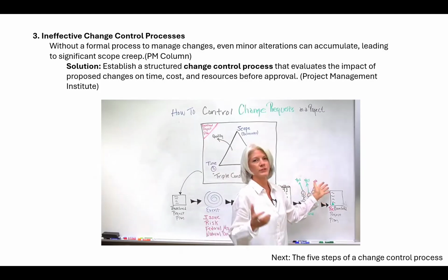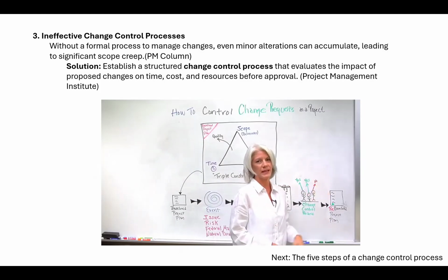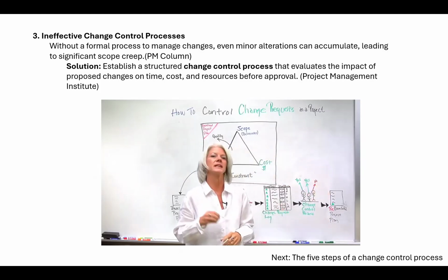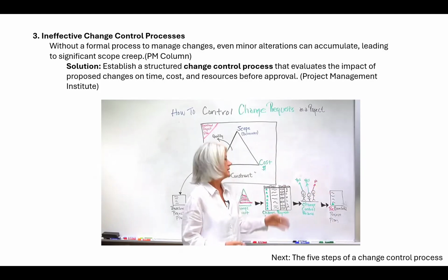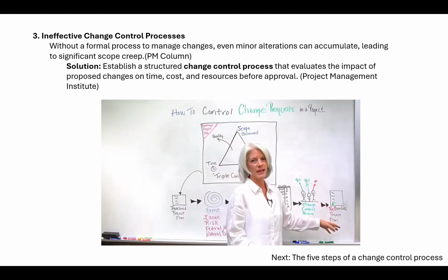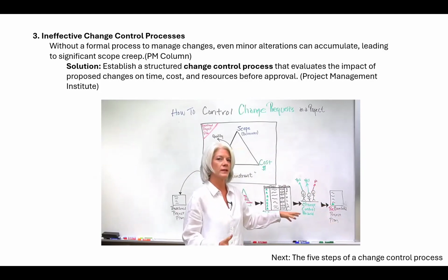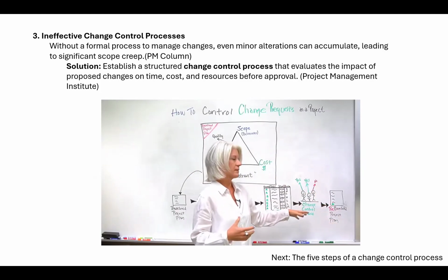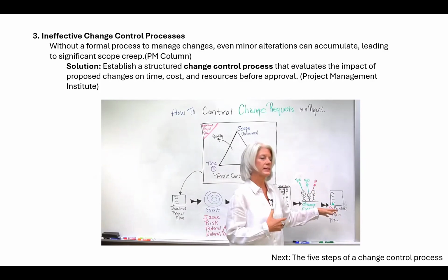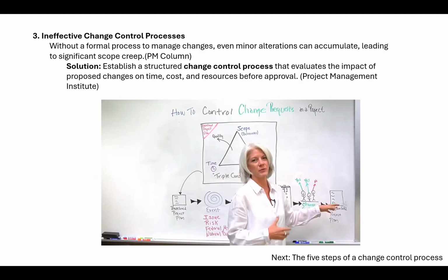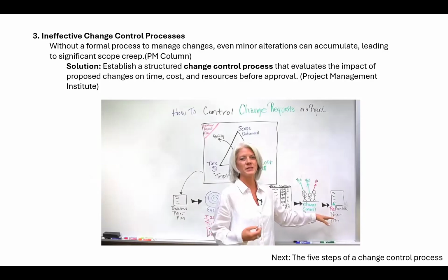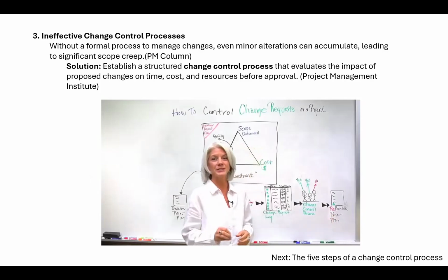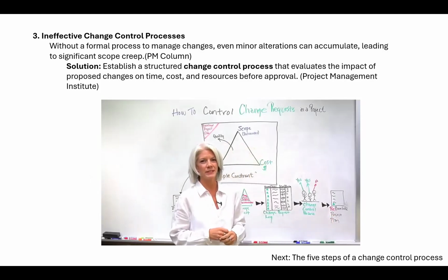And very important to re-baseline the project plan. On several of our whiteboard sessions, I continually say that the difference between a failed or successful project can simply be: did we go back and re-baseline the plan? Because if the Change Control Board approves the changes and that impacts the project, then it's authorization to go back and re-baseline the project plan. And after we re-baseline the project plan, it's important to execute the changes that have been incorporated into the plan.